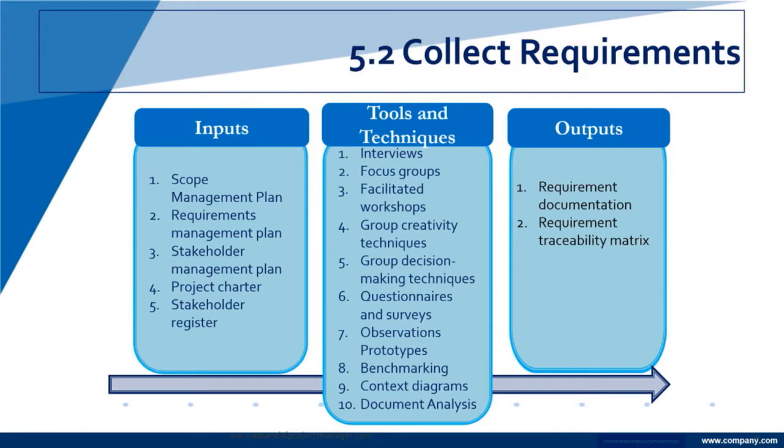Requirements traceability matrix, we'll look at one of those. That just allows you to track your requirements from the moment you identify it all the way until that requirement has been built into a service or a device or whatever, but it becomes a deliverable.